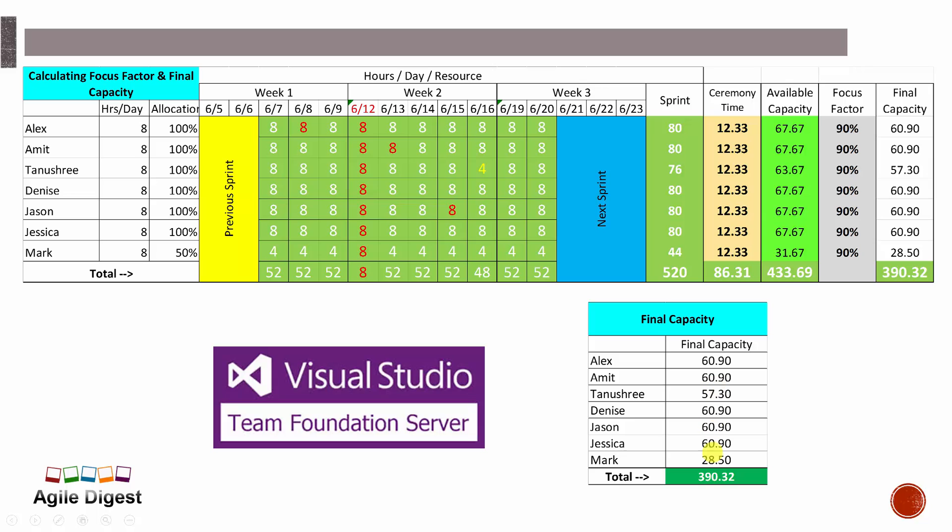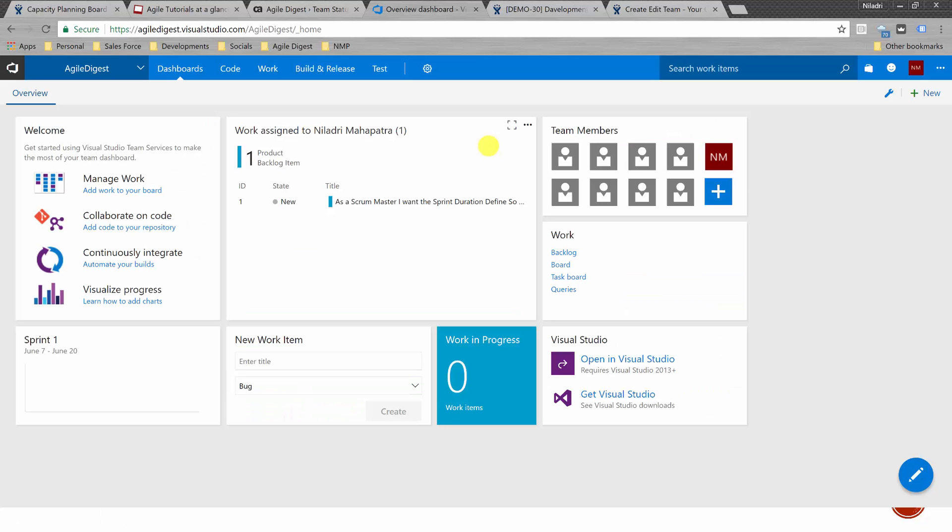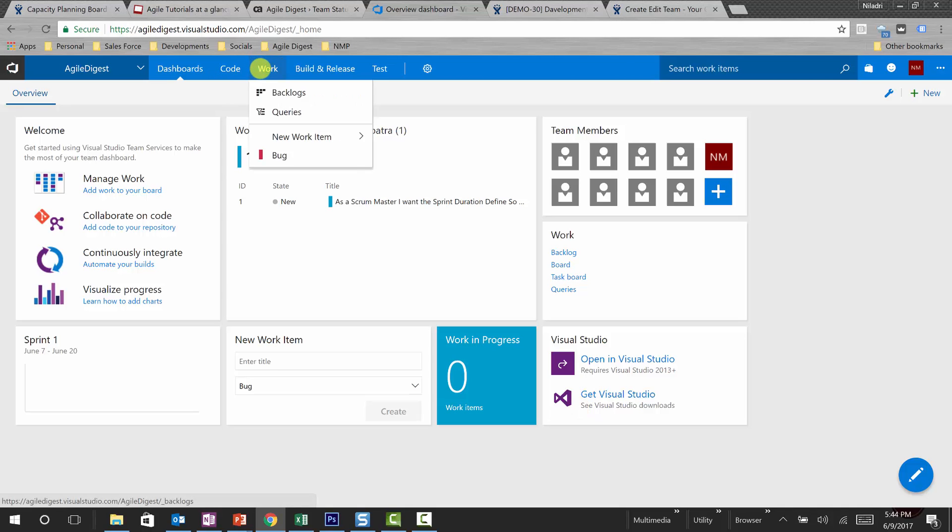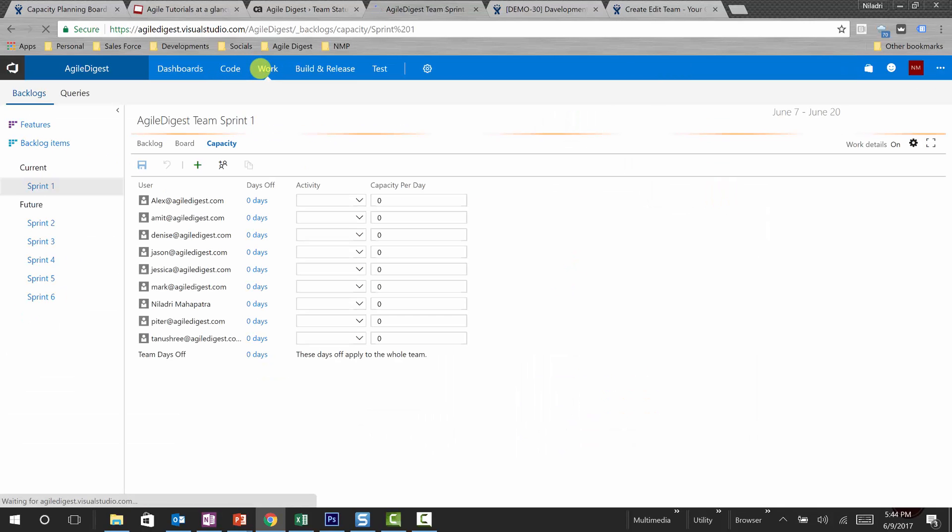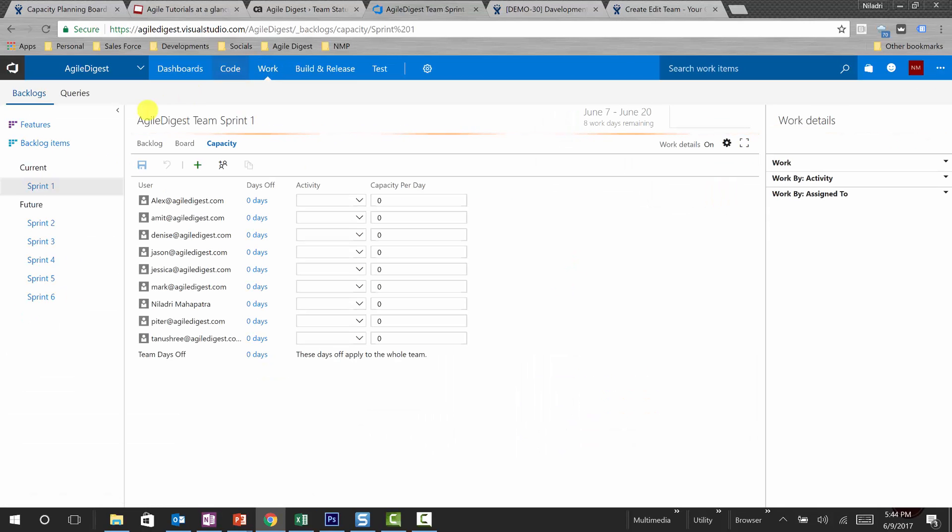Let's go to TFS and see how these values will be putting into it. So here if we actually look into the capacity, 60.90 will be kind of 6 hours per day. This is 6 hours per day, this is 5.7 hours per day because we have a 10 day sprint. Let's go to TFS.